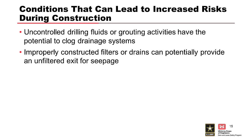Uncontrolled drilling fluids or grouting activities can clog drainage systems and increase the risk of internal erosion failure modes or structural instability. Improperly constructed filters or drains can create unfiltered seepage exits if those filter layers were placed too thin, missing, or inadvertently removed, and drain pipes that were not properly connected or were broken during installation can also increase risk.